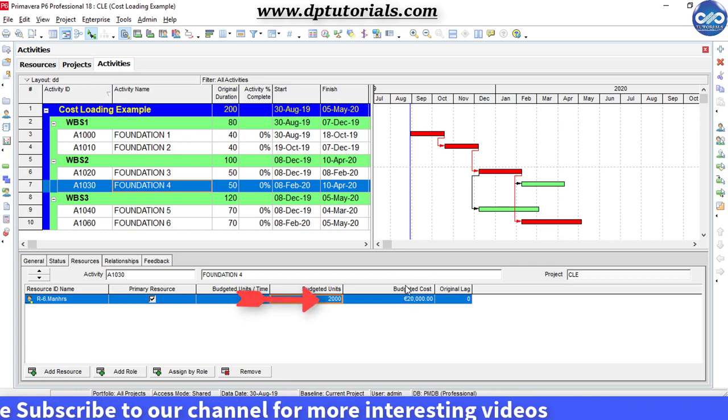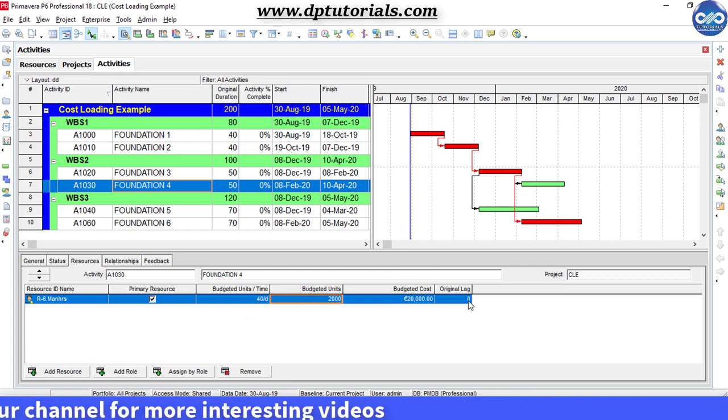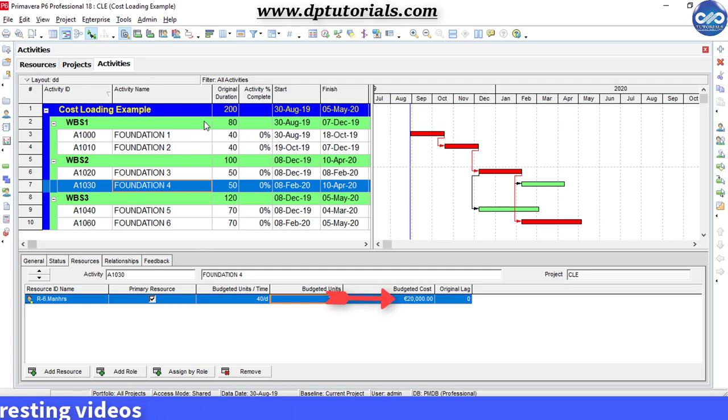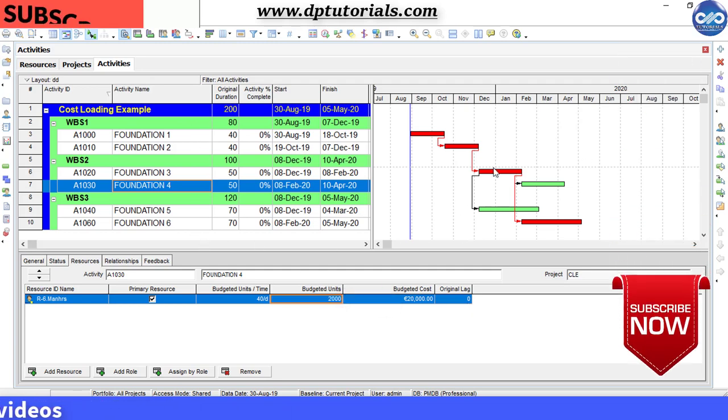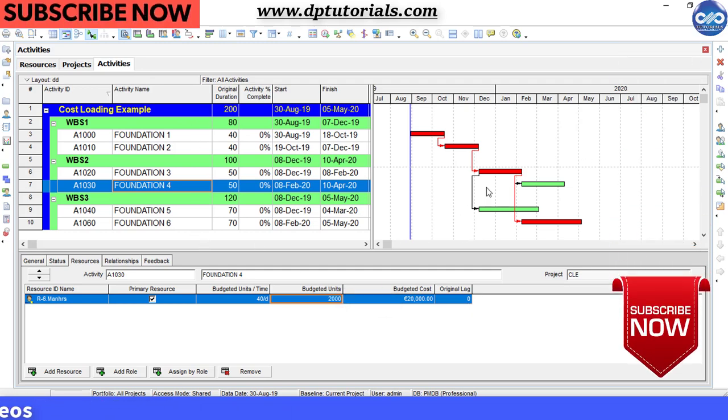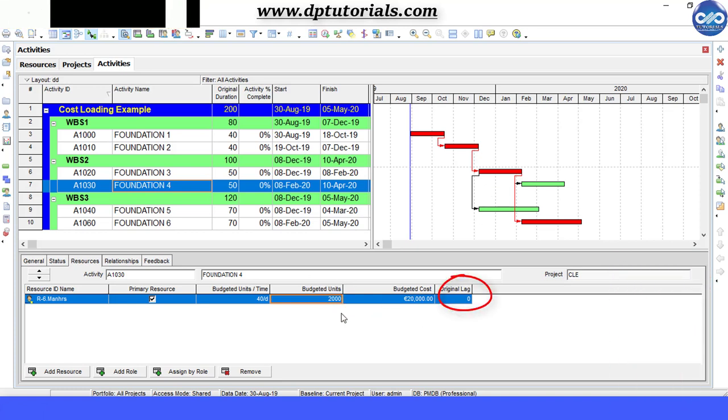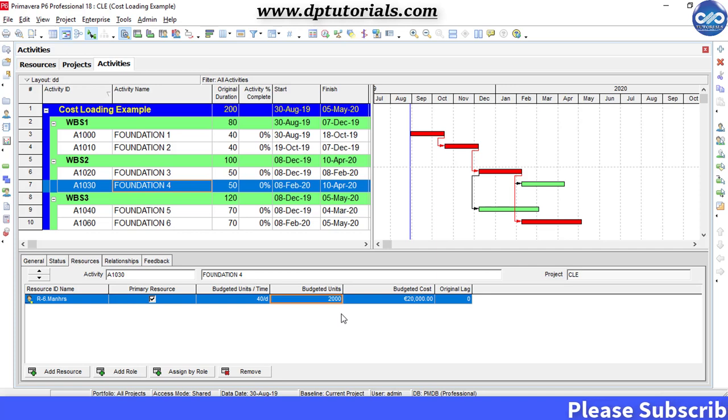I am giving here the budgeted units as 2000. So, my total budget will be 20,000 EUR. Original lag can be used to shift the cost of the distribution for the activity. It can be either positive or negative.